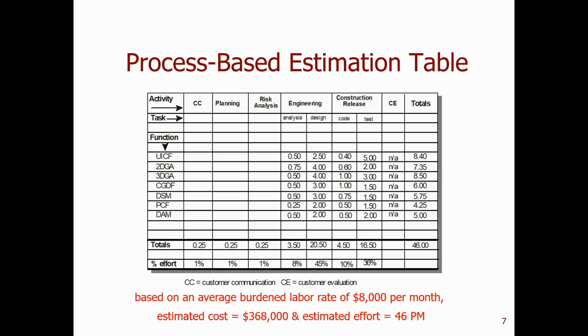So we only consider the task. It doesn't matter where you are, you're still working for the same task. You need half a month or 1 week to finish. So it doesn't matter where you are, you still need this many people. Using person months instead of dollar value makes more sense when we're doing this estimate, because this will help the top manager when they make a decision on where to allocate their team.